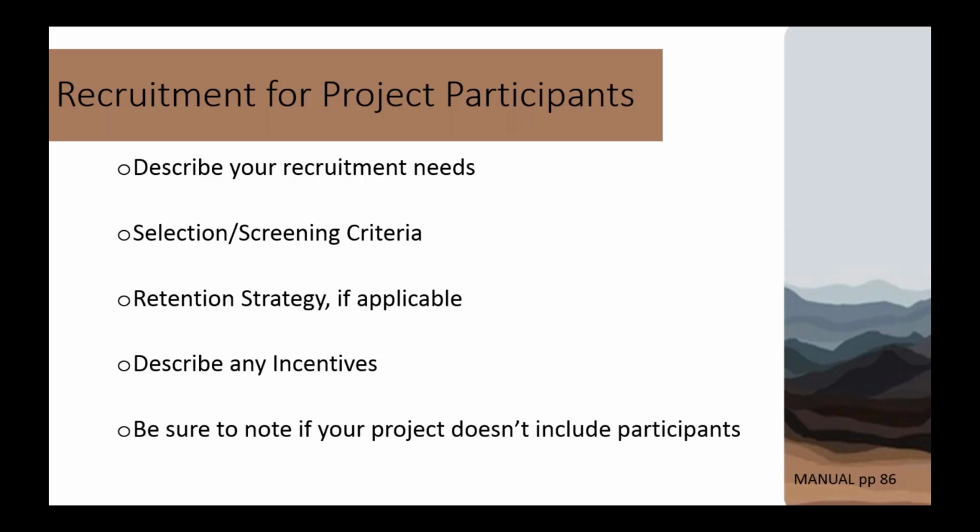And lastly, there probably are quite a few projects that don't even require recruiting people. Since it is an element and you're not quite sure what the reviewers will be thinking, they might think that you just didn't tell them you don't have a recruitment plan, and they might deduct points. So my suggestion here is to flat out state that our project does not include the recruitment of participants, and so this isn't applicable for our project. You want to be very clear about it so that there's no chance for misunderstanding.